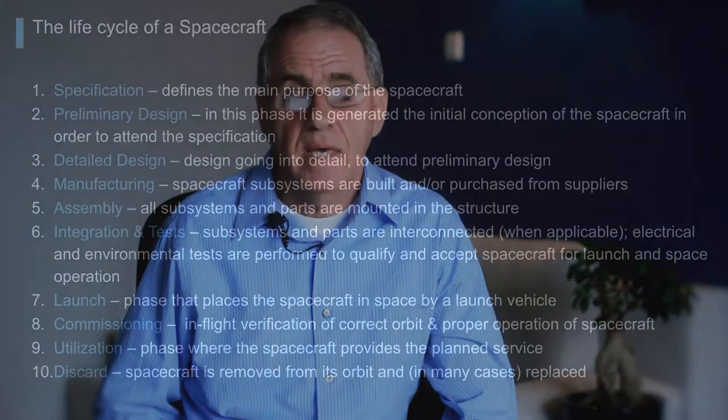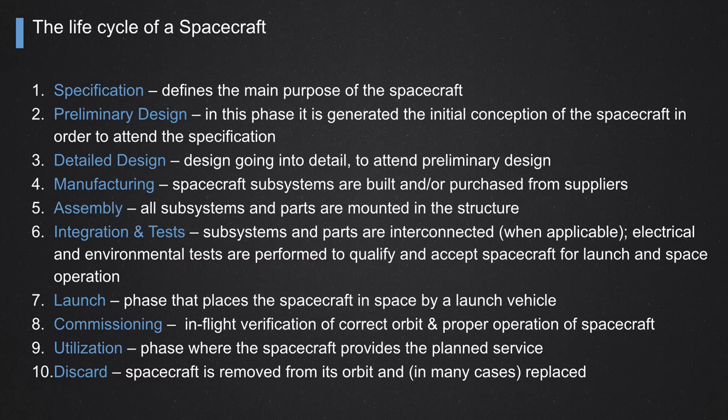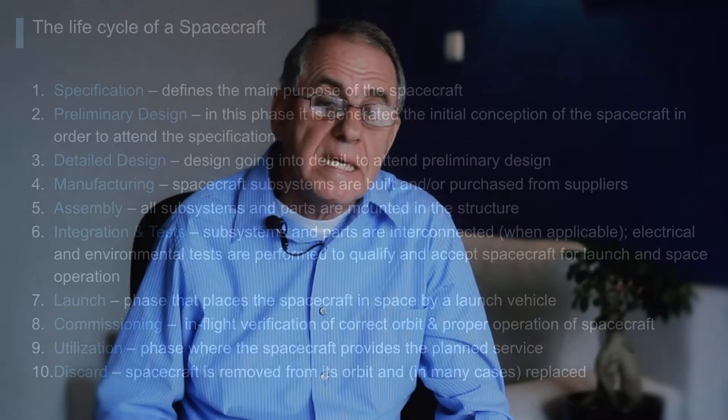Let's talk about the construction phases of a spacecraft - the different phases of the life cycle. The first phase is called specification. In the specification phase, people sit at the table and define the main purpose of the spacecraft: what is the spacecraft going to do in space, and why do we need that particular spacecraft. That's a very basic but fundamental part of the beginning of spacecraft design.